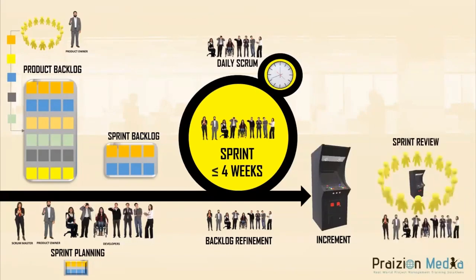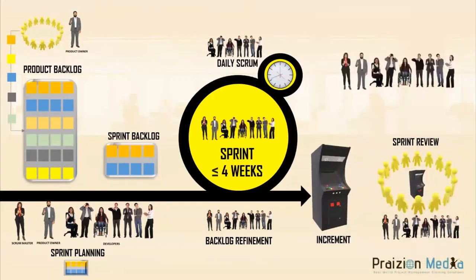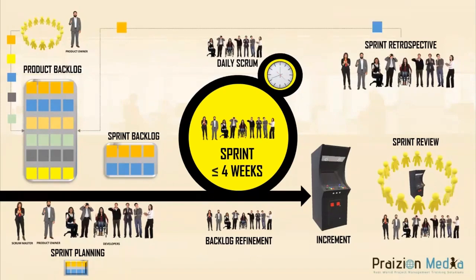The next event is the sprint review, where customers and stakeholders give us feedback on what we have created. From this great feedback, we know what to do in subsequent sprints. The next event is the sprint retrospective — this is where we look at what went well, what didn't go so well, what can we improve on right now, and what can we improve on in the next sprint. We put improvements into the backlog with a mindset of getting them done as quickly as possible.